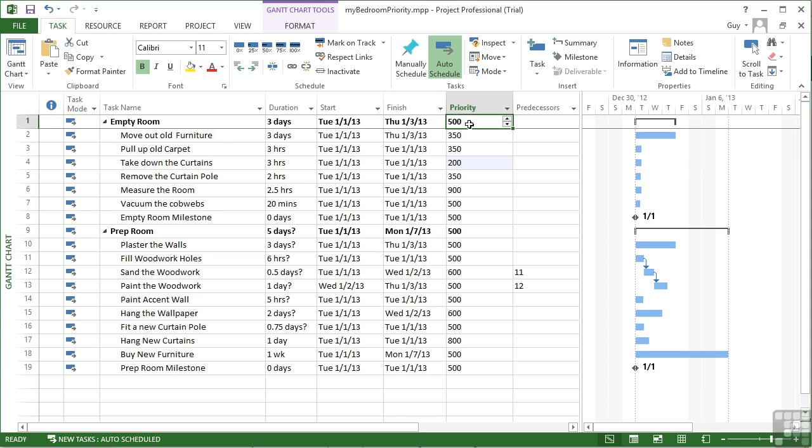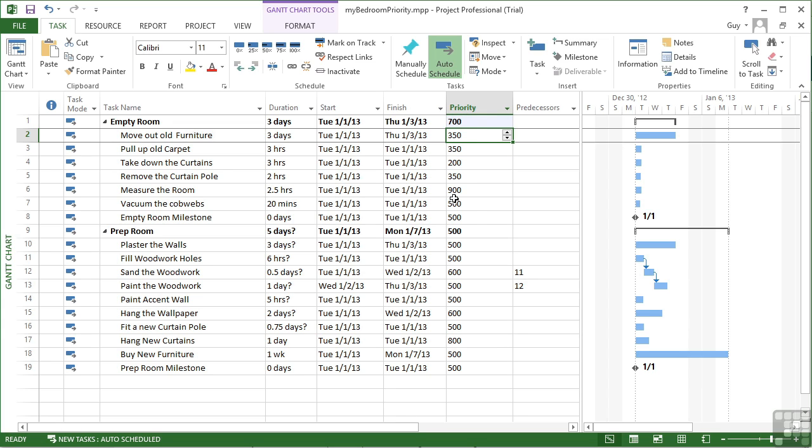The priority can be set for that section. So that section could be given quite a high priority of 700, and you see that that has no effect on the subtasks. It's just prioritizing that summary task, so that section of tasks.